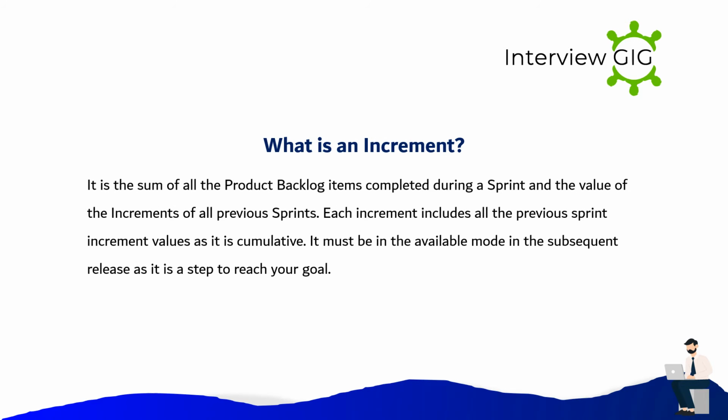What is an increment? It is the sum of all the product backlog items completed during a sprint and the value of the increments of all previous sprints. Each increment includes all the previous sprint increment values as it is cumulative. It must be in the available mode in the subsequent release as it is a step to reach your goal.